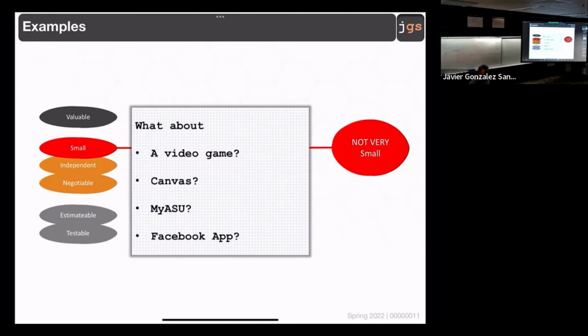So can we take it as like the previous example you were telling us about activities? So can we take it as something that can only be divided into activities small enough? Yes. I need to talk about that, but that is going to be one of the next things. Once we have our functional requirements identified, the next step is to specify the activities that are inside of each of those requirements. Because the activities are the ones that are going to help us to estimate the work. Activities are going to become important later with Agile because of our product backlog and so on.